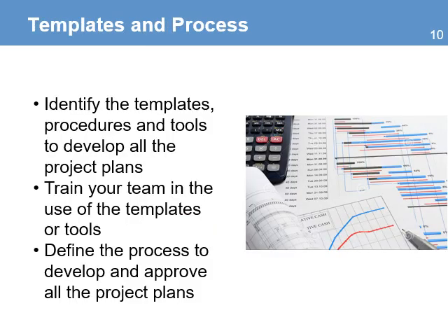The next step is to identify the templates, procedures, and tools to develop all the project plans. Depending on the amount of data and detail you need, you might need special software, for example, for the development of the schedule and the budget plans. You will also need to train your team in the use of the templates and the tools, as they will need to use these tools during the implementation and monitoring phases.